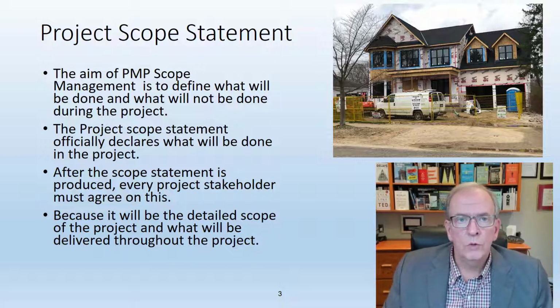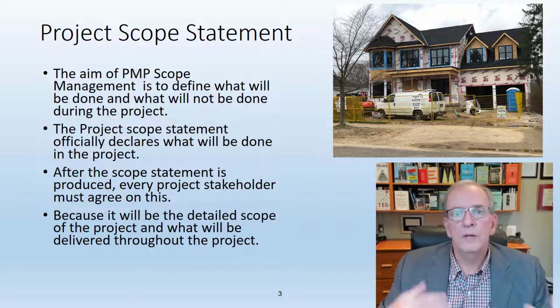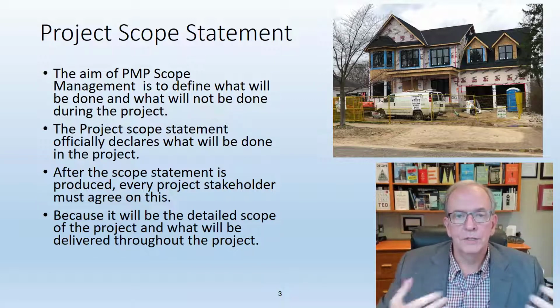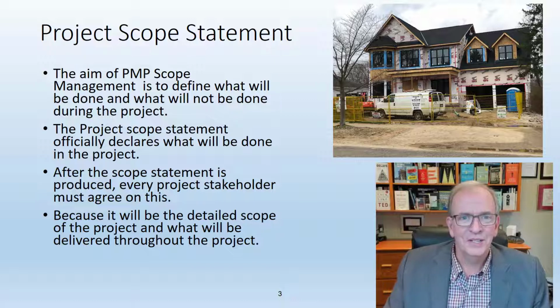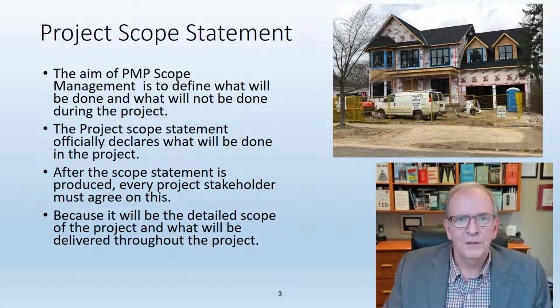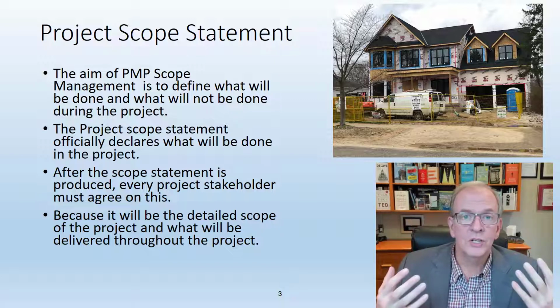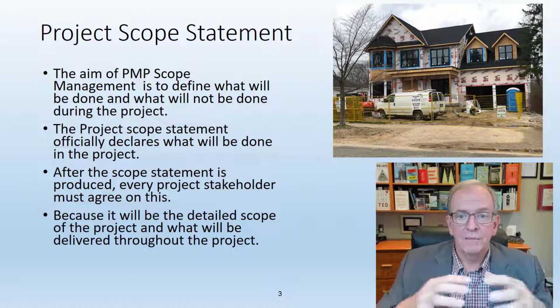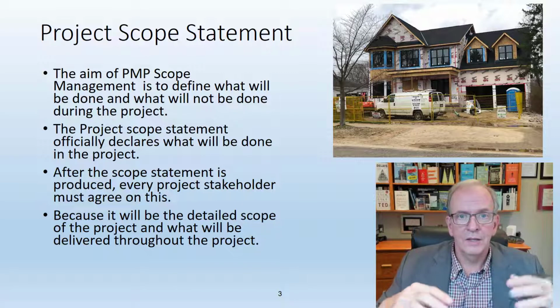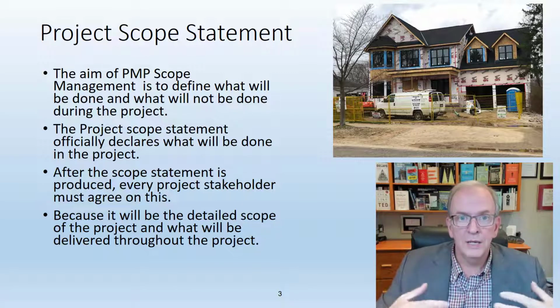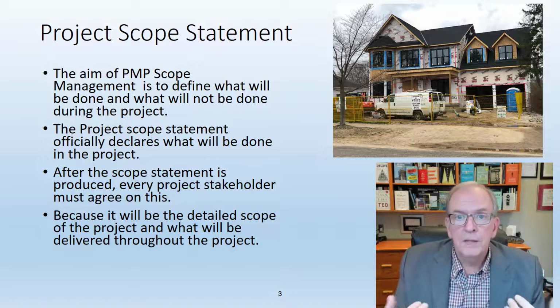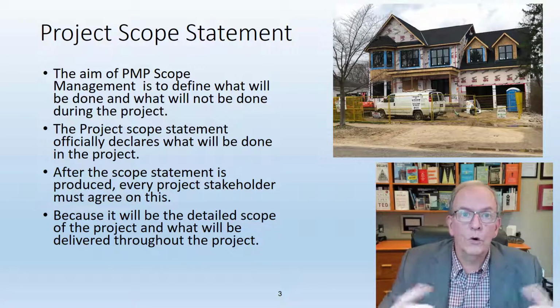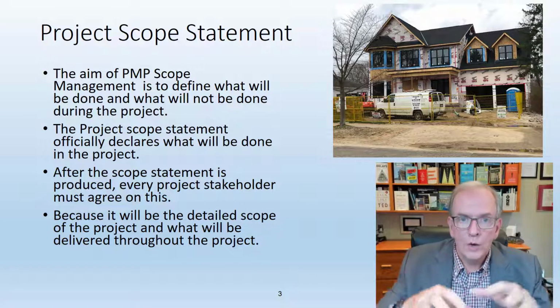And when you go through this process, everybody should agree to it before you start. Obviously, if you got conflict before you start, that can be a problem right off the bat, right? So you want to have that clarity right before you start. And often we don't do that. Now in construction, we do have the advantage that we have bid documents that are put out for bidding, and we receive the bids, and the contract is awarded, and the contract outlines what's included.